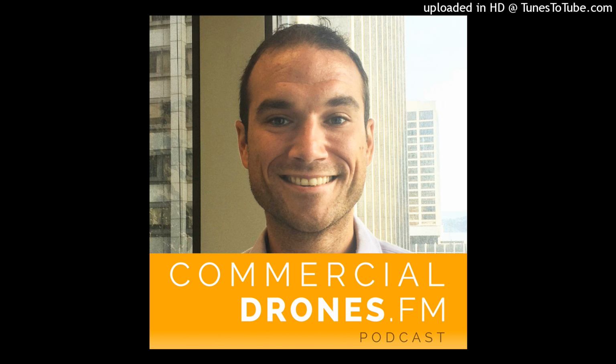But there are those 4 platform use cases, across the half a dozen or so pilots that we've done. There's been a common thread amongst them, and I can talk a bit about what those platform use cases are. Obviously, one I discussed earlier was surveying, precision surveying using photogrammetry. That provides us with digital surface models that our surveyors can use to track quantities or do change tracking.